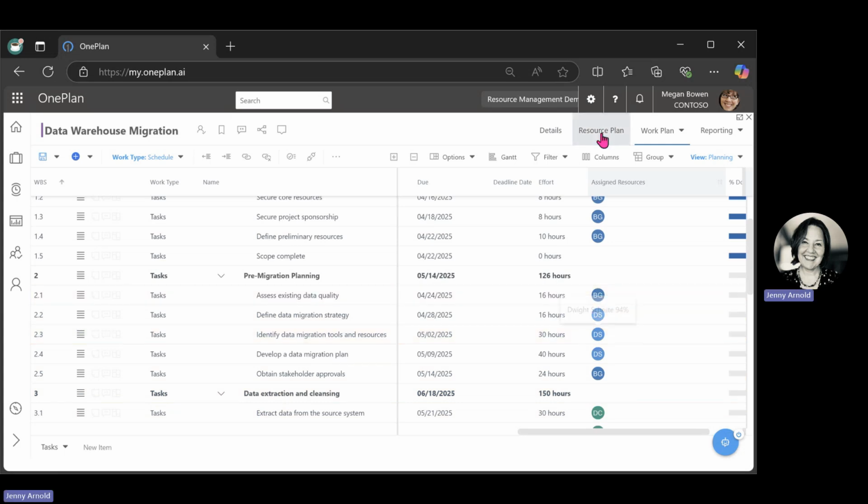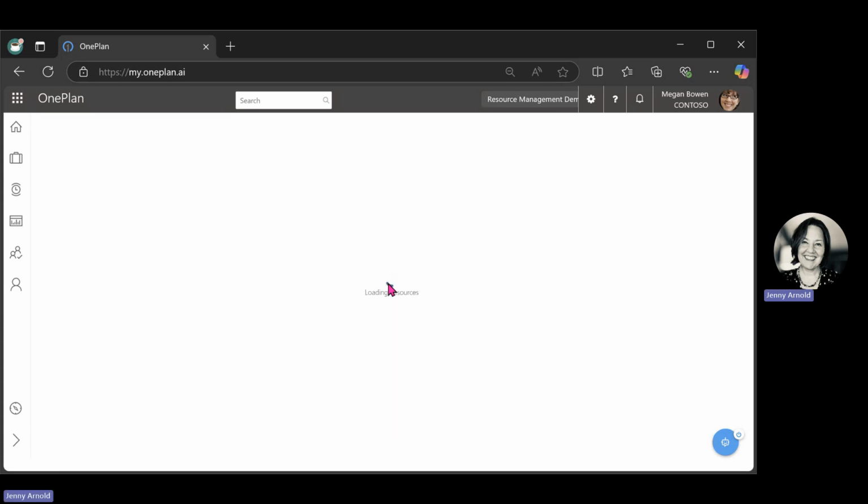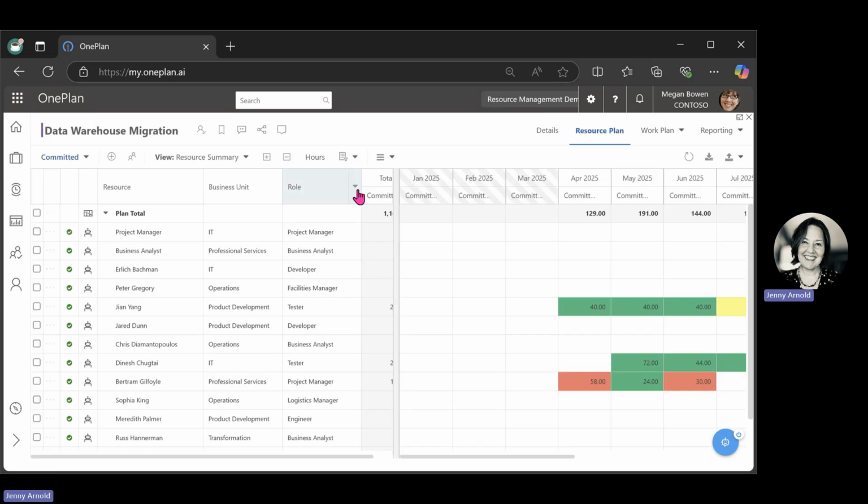And then when we're in our resource plan, what we can do is you could copy the data if you decide that you want to start from bottom up and you want to schedule all of those resources, actually assign them to tasks in your plan schedule. Then what you could do is you could also bring them here into your resource utilization. And you do that by copying all of those values. Okay, so we can do that here.